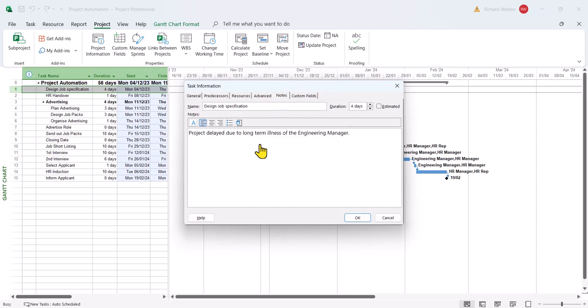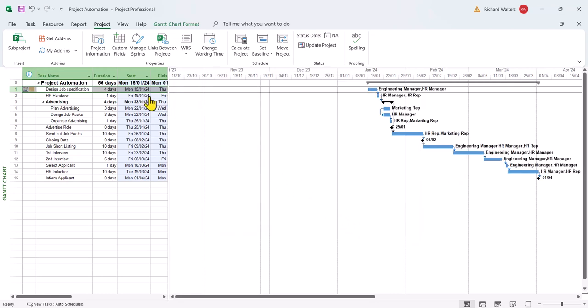The minute we click OK now, we'll watch all the dates change and the task 1 will move out now till the new date I've selected. And every other date will be delayed. And there we go.